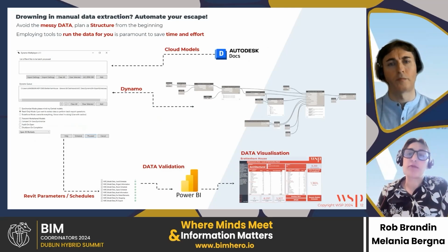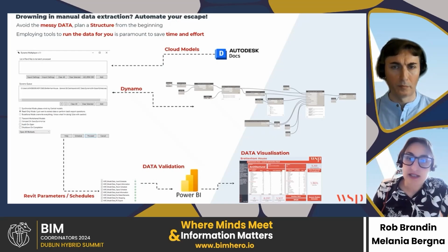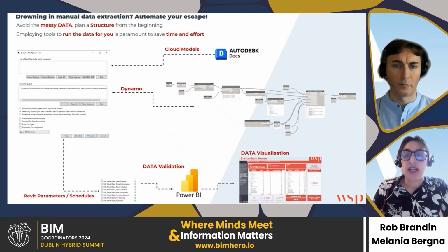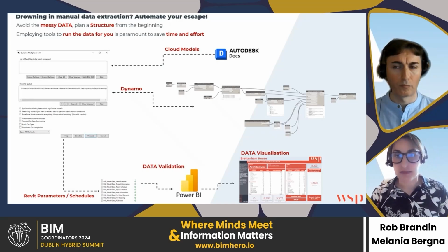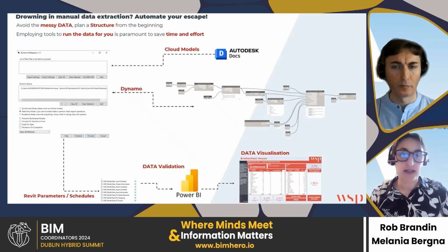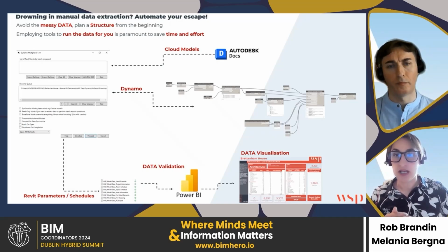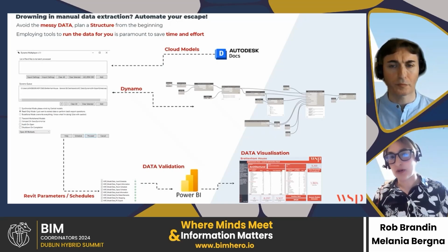In this situation, for example, this is a simple workflow that we have set up. What it basically does is that we have utilized an add-in on Revit, and we create a schedule export by Autodesk Docs. Then we'll export the schedules on the models. By setting up shared parameters, we have told design teams where the information needs to be appropriately located. So we're able to export the schedules that are read by Power BI and report exact data.